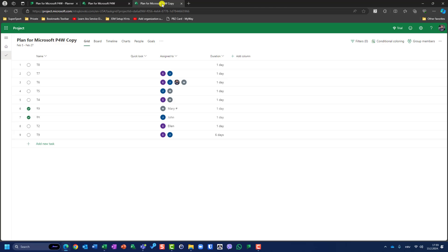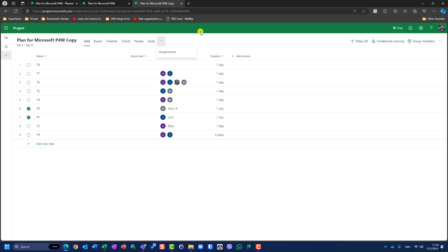That is how you can copy plan to a project. One more question which you can ask: Nenad, can we do it in reverse? Can we create a project and then create a plan in Planner? The answer is no. This is a one-way street, so you can copy plan from Planner to Microsoft Project for the Web, but you cannot create a project in your Microsoft Project for the Web and then create a plan. For now, let's wait for the new Planner and you will see how it works when it will be live.